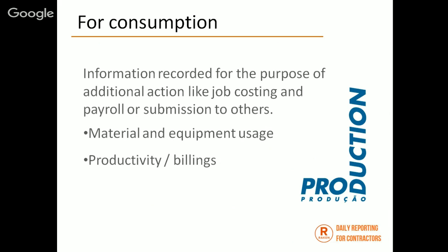We had a project we were doing, well, actually several projects, but we had a superintendent that was running some projects for us. And we were watching his production, and we were looking at our material consumption versus his productivity. And we started noticing that we were always running anywhere from 2 to 6 yards over. We could find that in any given week, right? We were often running over on concrete materials. We couldn't figure out exactly what was going on. At first we thought it was just poor preparation, but this triggered us to look a little closer, and we found out that he was actually doing side work using our concrete. So he was going to the houses where we were working and pouring driveways and stuff like that with the leftover concrete.